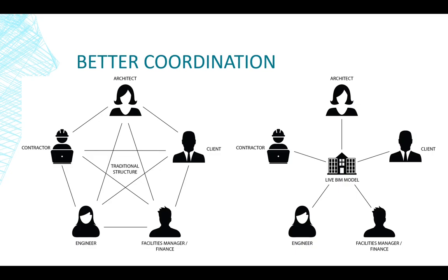And again, the bigger the project, the more complicated it can be. So when people are looking for requests for information, like the architect is looking for a particular detail or the contractor is looking for a particular detail, in the old uncoordinated method, it involves someone, possibly like me back as an AutoCAD technician, driving around, editing drawings, printing stuff off, giving it to one person. The other person might not have the most up-to-date drawings. So it really was an inefficient process.